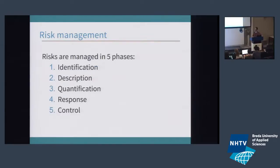We do this risk management in five phases. We identify risks — we give them a name, call out what they are, describe them in detail. We attempt to quantify them in some way so we can prioritize. We're going to have different response strategies. And then we might need to control the management of it and monitor it as time goes along.